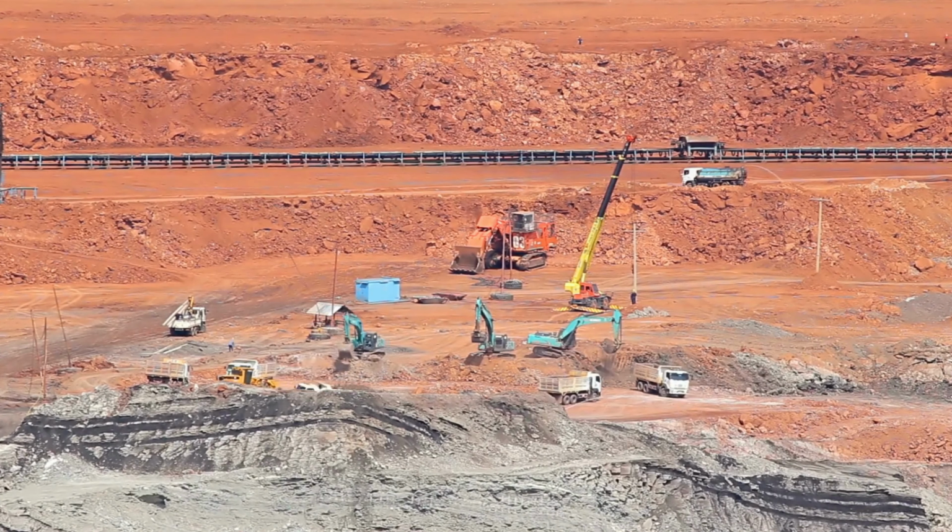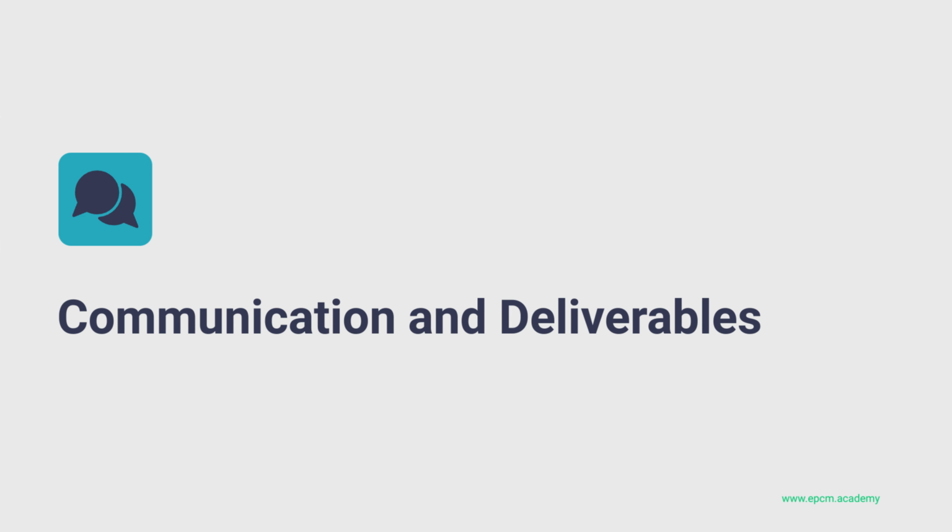It all starts with a formal change request. Anyone proposing a change to the project needs to document it. What are they changing? Why are they changing it? And what impact will it have on the scope, schedule, and budget? So they're not just saying, hey, can we add this feature? They need to justify the change and provide all the details.